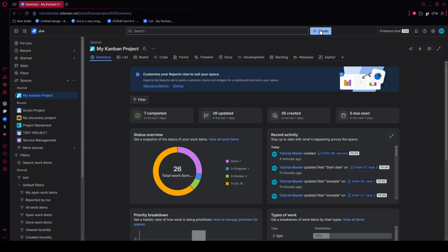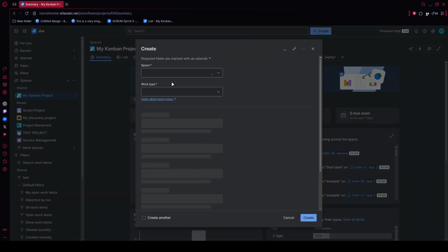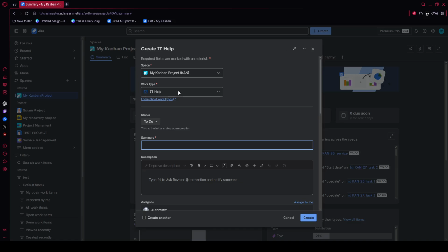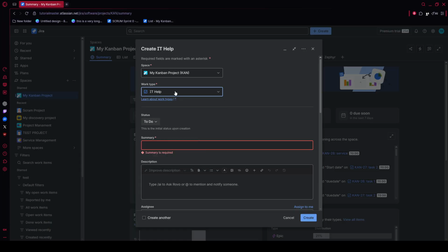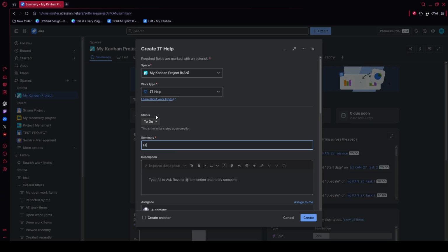After that, create a visual view for decision making. In the left sidebar, find the View section, click Create a View, and select Matrix. Set impact on the vertical axis and effort on the horizontal axis. This turns your idea list into a live impact versus effort map, which is especially helpful during planning and stakeholder discussions because it makes high value, low effort opportunities easy to spot.